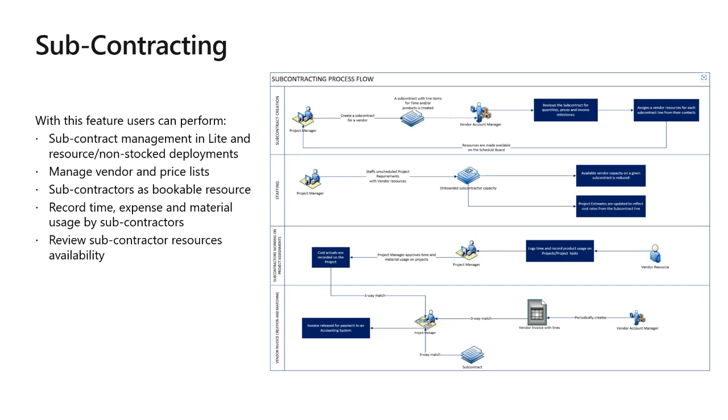In addition, it provides the ability to select the subcontract and subcontract line during entry of the actuals, meaning creation of time entries, material usage logs, and quick expenses. Those actuals, of course, would then be approved and processed as usual. So that's in terms of the entry.